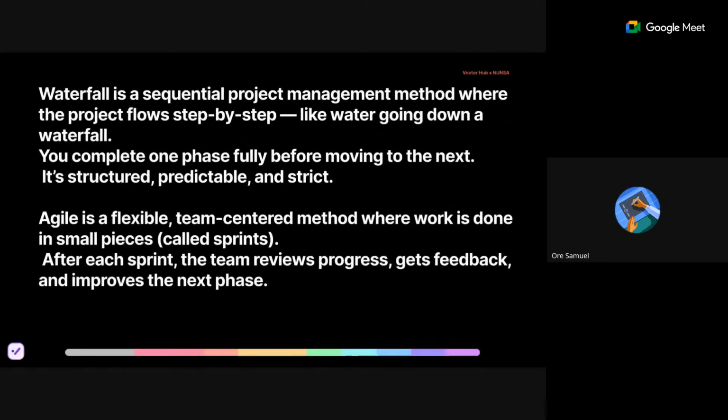Okay, this is the sitting room. Are you satisfied with how it looks? He says no, that he wants to change something. It will be so easy for him to change because we've not really gone so far, right? We've only built the kitchen and now we're building the sitting room. So if there's something that needs to change in the sitting room, fine, you can always change that, right? So the main difference between waterfall and agile is room for change.